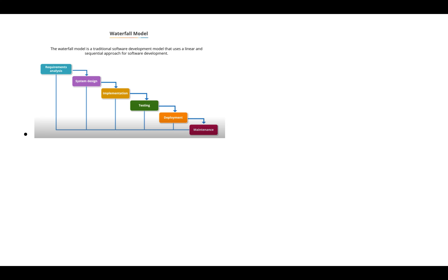There are chances that once the project is deployed and the client reviews the product, he may say the product is not what he was expecting. Or maybe the requirements he gave five months or one year back are completely outdated now — some different trend is running in the market, or a competitor is using some different advanced technology. So whatever effort we have done is completely gone to waste — that is the shortcoming of the waterfall model. Waterfall is beneficial where the project duration is very short, like one to three months, but for longer projects agile is recommended.